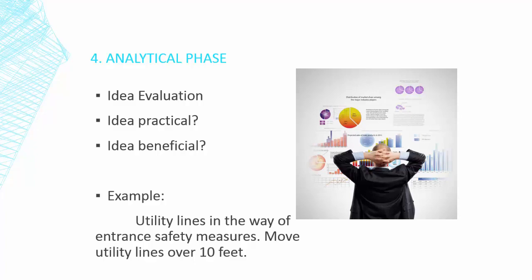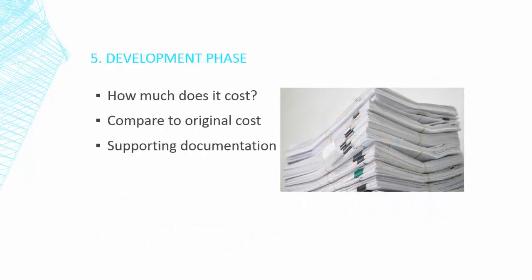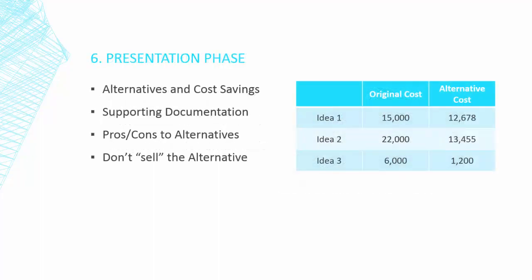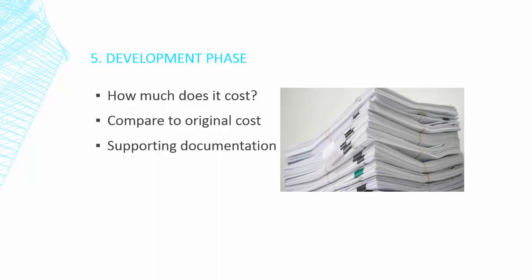Once we get through the analytical phase, we go straight into the development phase. The systems that make it into this phase begin underway of development into the project and an assessment of the new system costs are compared to the original. In this phase, concepts must be developed to completely show that the function of this new system meets or exceeds the original one. Back to our example, it's here that we'll determine the added cost for the window film, the bollards, the barricades, shrubs, any additional work to the utility lines. We'll deduct the blast-resistant and pressure-resistant windows because that was based on our original budget.